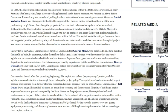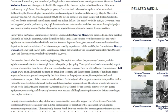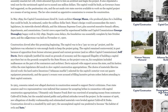Jumping over to the Encyclopedia of Arkansas — a little more detail. By 1899 they had enough money to build the new building, decided to build it on the site of an old prison — the penitentiary site. They created an act making 200 convicts available to work on the capital project as a means of saving money. The previously mentioned Donaghy became the capital commissioner and oversaw the 200 convicts on this build — so we're talking about unskilled labor on this project.